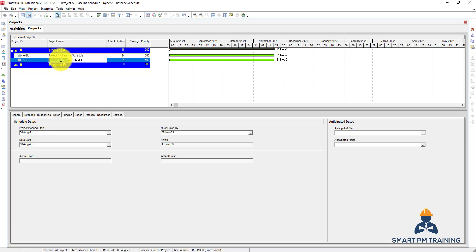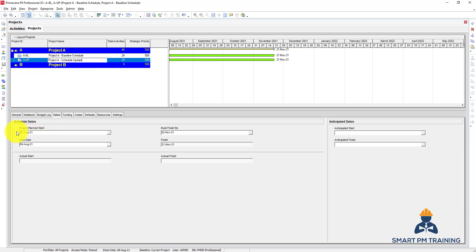Schedule update. The start is 8th of August. Let's say this is the first weekly update we are having, so 15th of August is the data date.